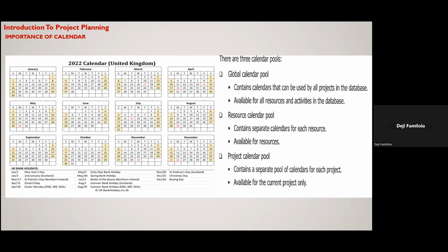And most of the time, once you've got their working calendar, you need to go and check the bank holidays for that year. If they claim they are not working on bank holidays, you must block all those bank holidays out. No work on that day. If you have a bank holiday like last year, I think in May we had 3 days off.